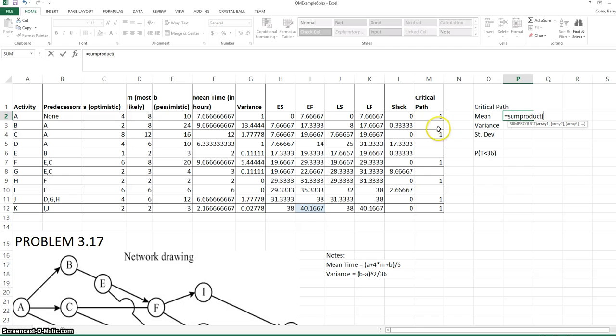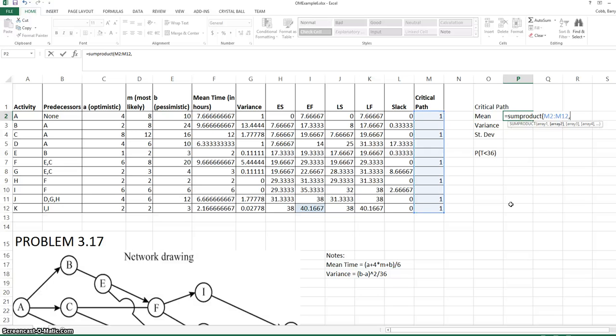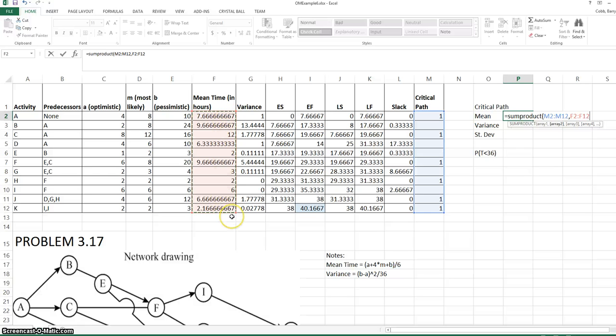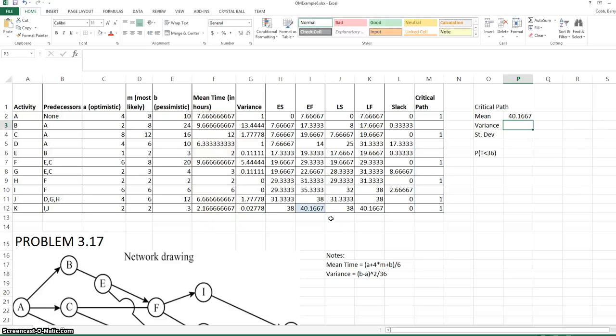Because we have the ones marked in the critical path column, we can sum up the mean times on the critical path by using the SUMPRODUCT formula, referencing the critical path column, entering a comma, and referencing the mean column. The SUMPRODUCT formula goes row by row and multiplies values in column M by values in column F. So if there's a blank or a zero in column M, it's simply going to ignore the value in column F, and it will sum up all the other values that are on the critical path. And we see it's the same as the project completion time.